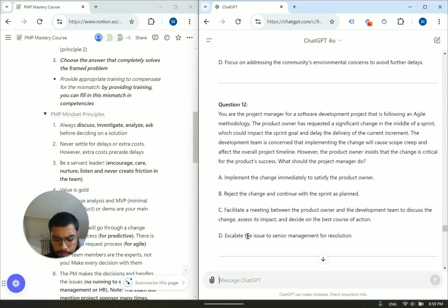Okay. When the sprint starts, there are no more changes that are coming in. So the sprint starts. Someone could come along and say, hey, we should change, I don't know, the color of this dashboard to something else. No, there's no more changes. When the sprint is over, then recommend your changes. However, there are some exceptions.